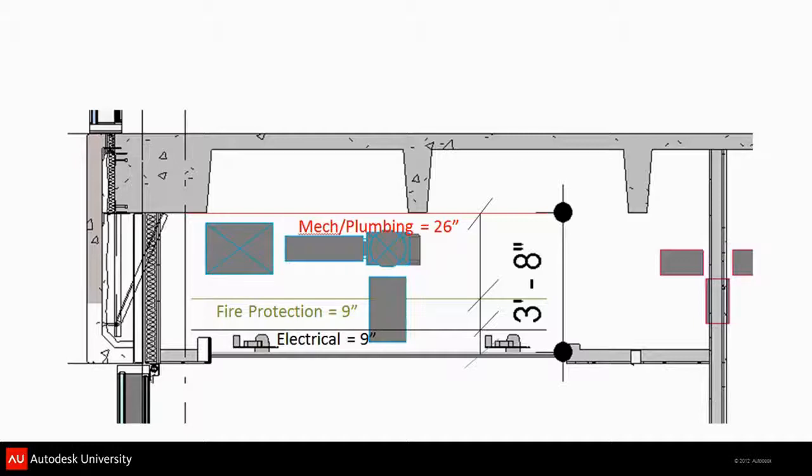We put this in a PowerPoint. We get everyone around a table. We show them. And then we take notes and edit this in the PowerPoint in front of everyone. And then we make a PDF of it and email it out. And we say, this is our game plan. Notify the team when you've got exceptions that you need to run this. It's a guideline. This is not written in stone.